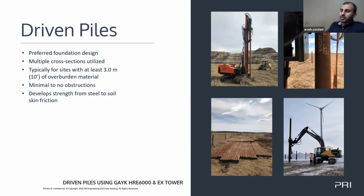In fact, too often we've seen it, and all 3 of you have brought it up, where you have a designer that tries to design a site with one foundation type. The likelihood of you taking a 40, 50 acre site and having homogeneous subsurface conditions is extremely unlikely. Whether it's 5%, 10%, 20%, 50%, it doesn't matter. Regardless of what that percentage of difference is, if that hasn't been accounted for in the design, you're going to have 5%, 10%, or 50% of the site where those very large construction costs that both Vishal and Dan alluded to, throw Greg's spreadsheet out the window. All of a sudden, the financing of the project is in question, because what was originally financed is not the reality. So watch out for those spreadsheets.